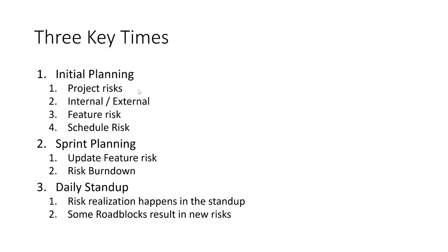And in the daily stand-up, this is what stand-ups actually are all about: coordination and risk avoidance. The whole point of coordination is that there's risk associated with it. If I'm working in one part of the code and you're working in another part of the code, there's a risk that we're going to step on each other if we're not decoupled enough, if those modules are too closely associated, or if maybe we're both working in the same part of the code, then we certainly need to be working together.